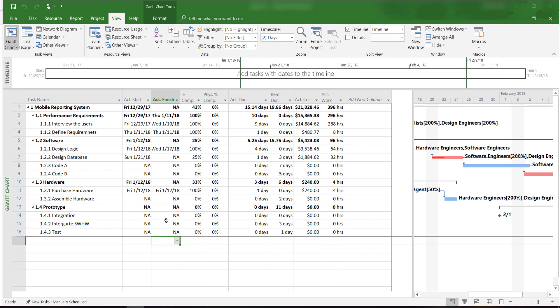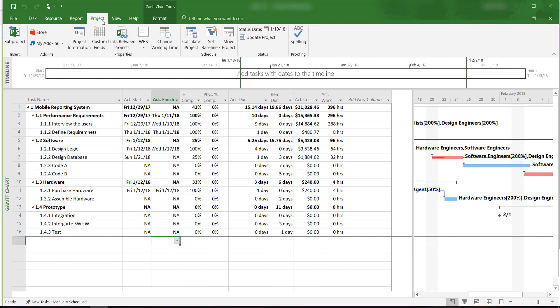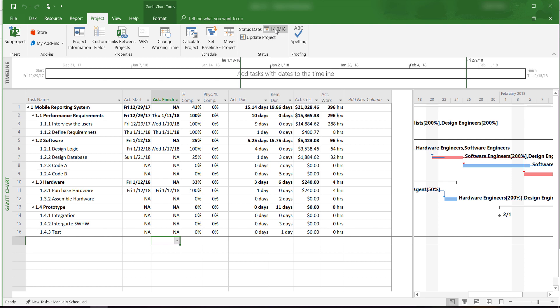Now that we have entered our actual progress, we want to look at our earned value and other indicators in order to see how well we are doing. Before we do this, we always want to make sure that we have the correct status report date. Under the Project tab, we can confirm that our status report date is January 10th, which is what we wanted.